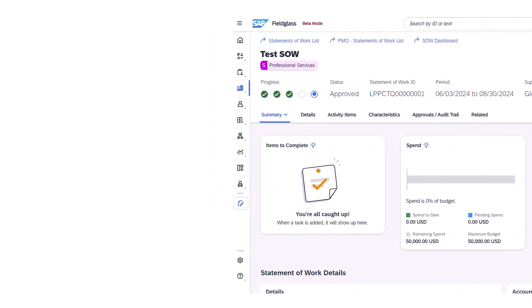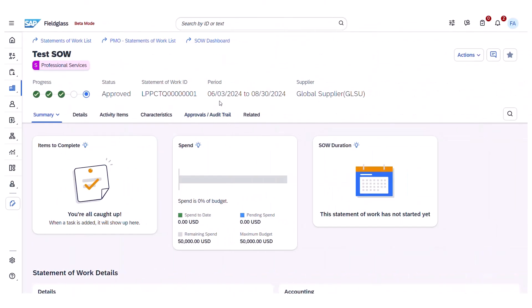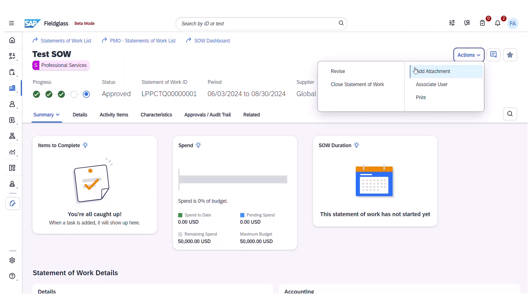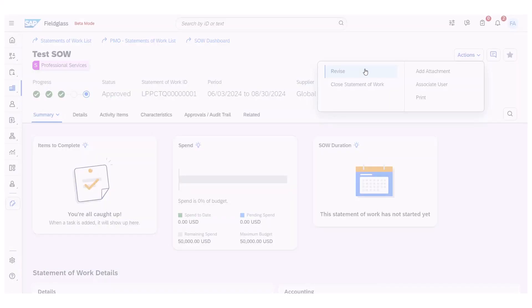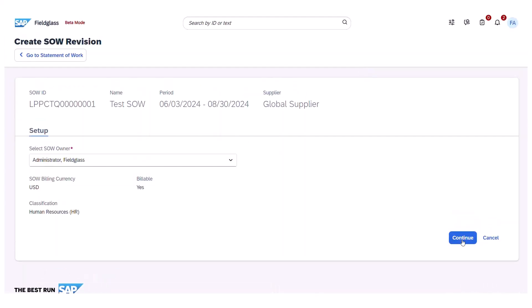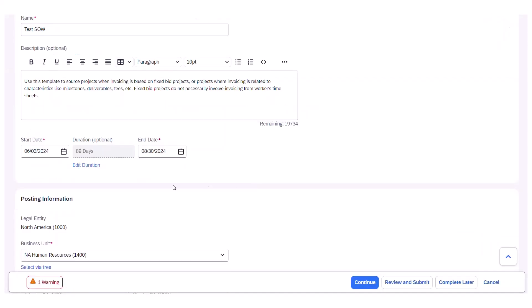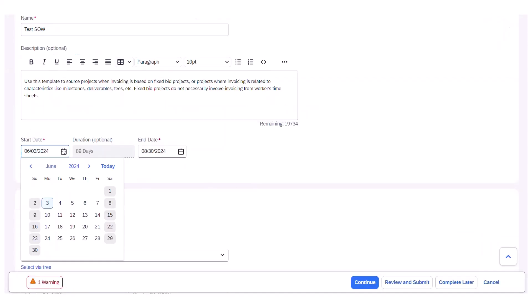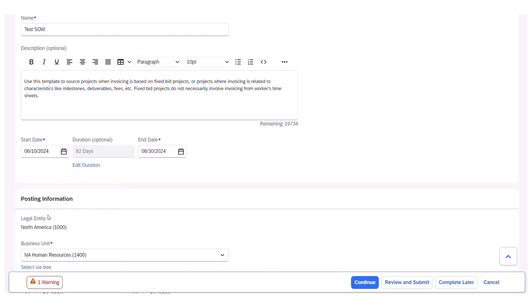Let's take a closer look in the Fieldglass application. Let's say a Statement of Work owner needs to push back the start date of their Statement of Work by one week due to delays. The user can now simply click Actions > Revise to start the process of updating the start date. The user will click Continue to move forward with the revision. The user can then select the Start Date field and move the start date to the following week to account for the delays. There is also the option to enter the duration to ensure accuracy.